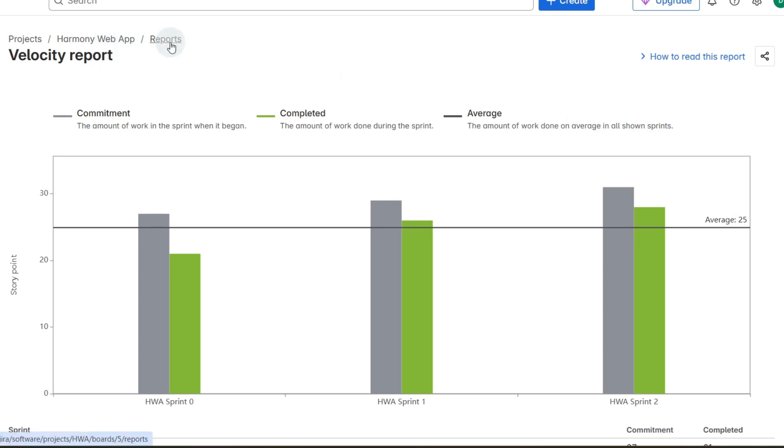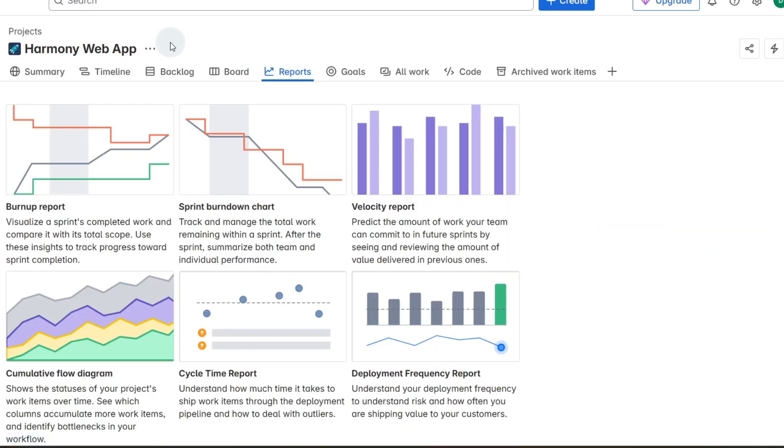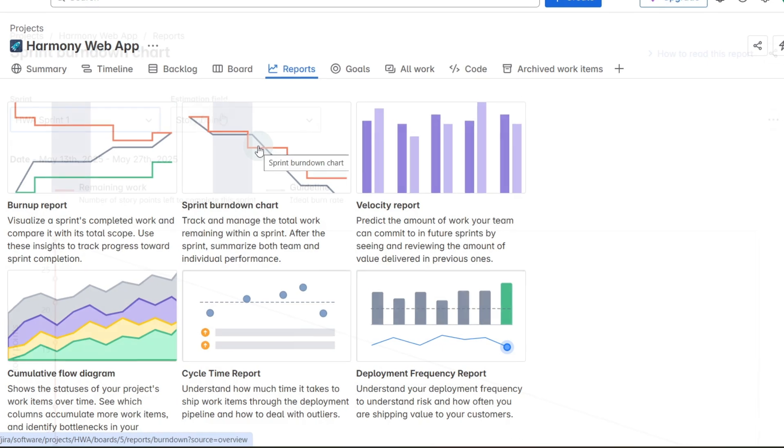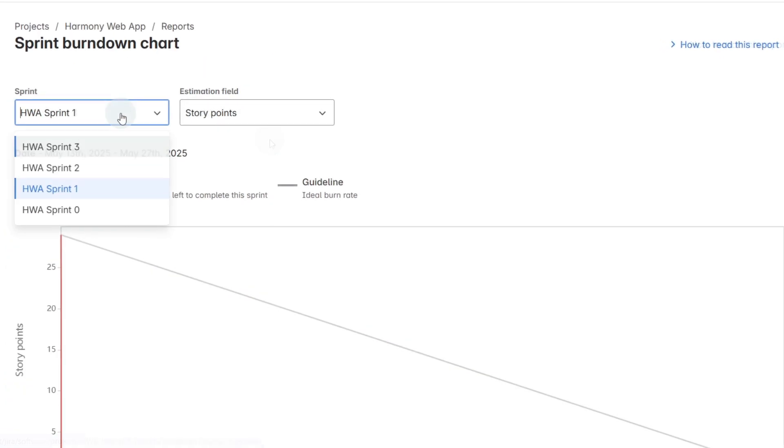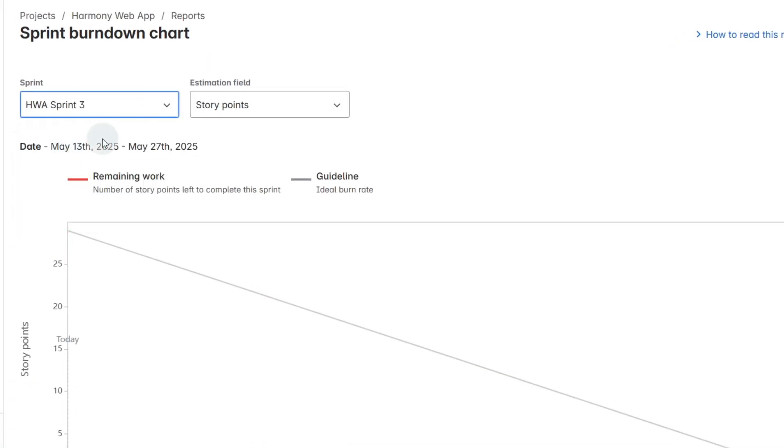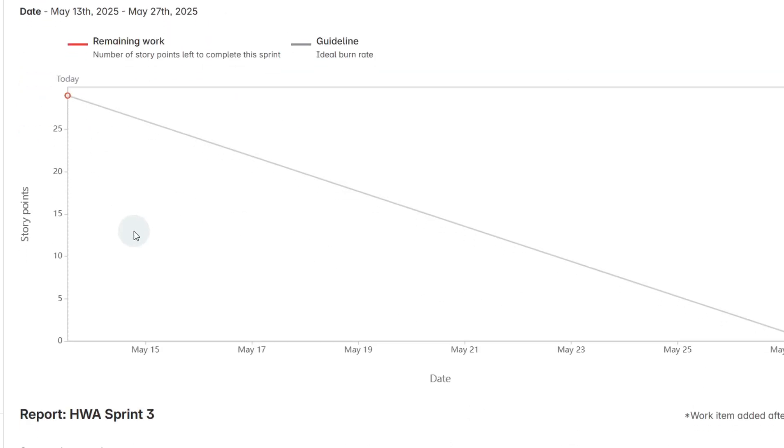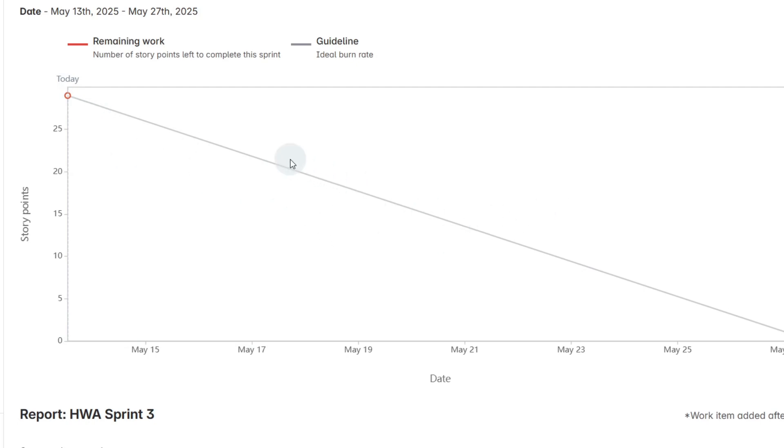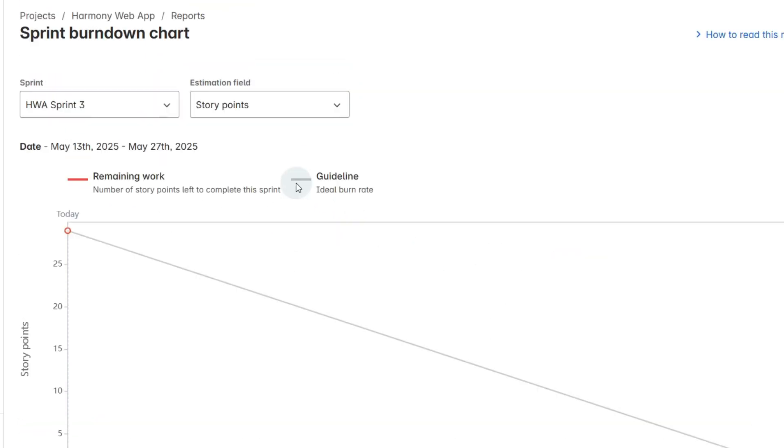If we go back to reports and down to the burndown chart, if we select the sprint that we're working in now, I've just done these all on the same day so it's not going to show us, but usually over the two weeks it will show us the work as it goes down and here's the ideal trend and we can see that work going down as we completed during the sprint. That's our sprint burndown chart.